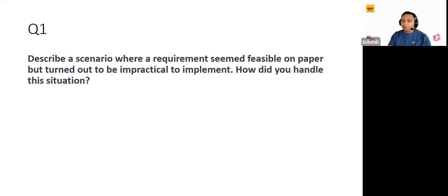And we went one step further: we provided an alternative solution. The team suggested offering an option for customers to initiate the fund transfer request through the app and complete the process at the physical branch. This approach aligns with the regulatory requirements and minimizes the risk. The team documented the entire process, including the challenges, decisions, and the alternative approaches. These lessons learned would serve as valuable insight for future projects in our program, which again consists of several projects.